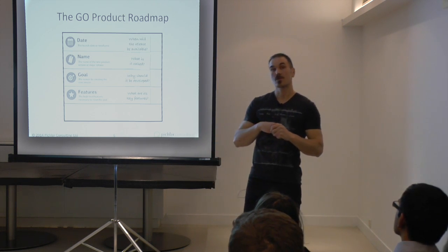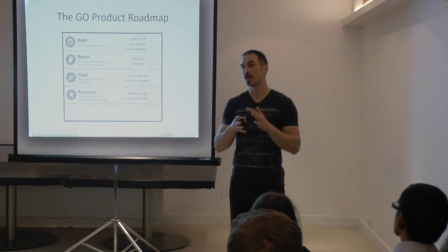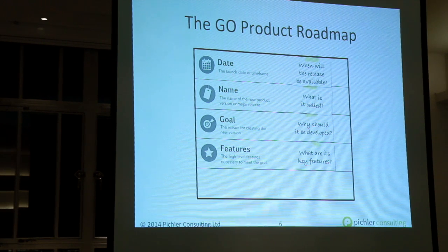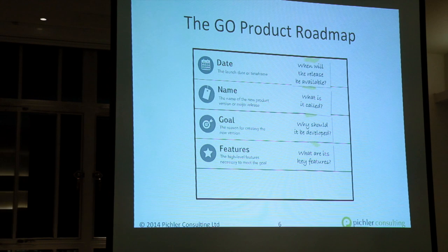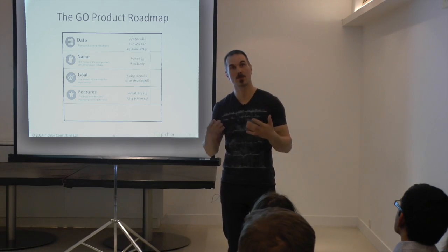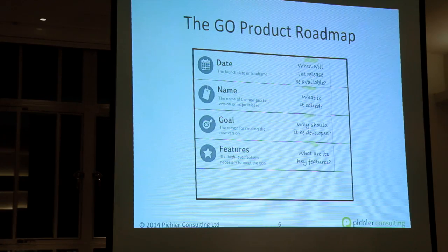And the other suggestion I'd like to make is limit the number of features to 2 to 3 per release here in your roadmap, and keep them really at a core strength level. And the details should be then in your product backlog or product canvas. So the details that you need in order to actually build the product. So keep this at a fairly high level, so it serves as a strategic planning tool, and don't mix the tactical, operational, and the strategic level.